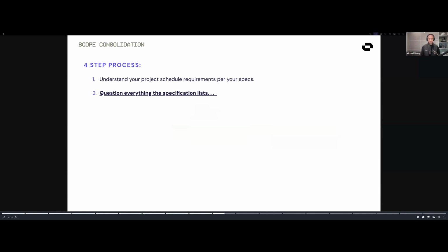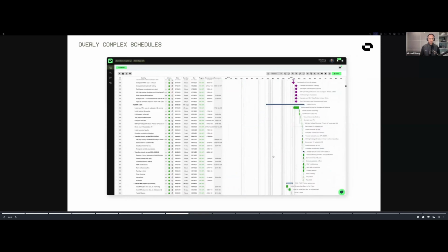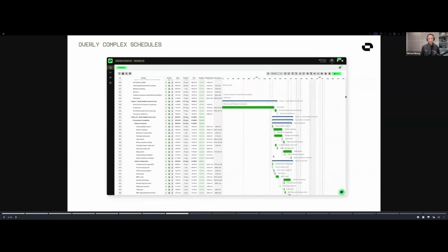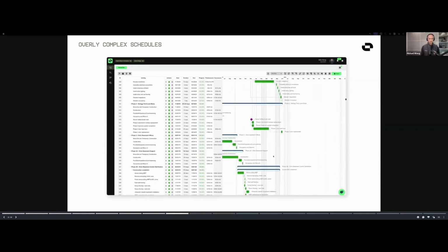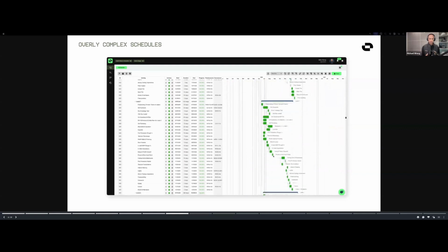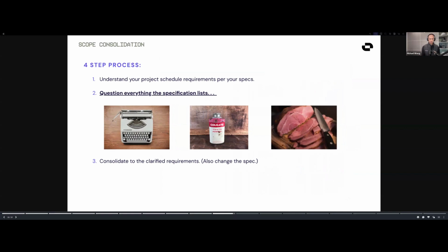If it's not this, don't do this, right? If it's not this much detail at the start, if you can distill that down to that first requirement, I don't need level 5 detail, I don't need single trade inside of two weeks detail, don't put it in the specification. Don't keep requiring it just because it's been in there. So once you confirm what the requirement is in the spec from every stakeholder of a job, make that clear. Say that this was updated at this point, and then make sure it's changing the spec, right?